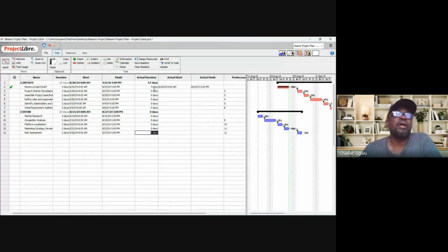If it's approved, then you have to rebaseline it. Anytime your actual is deviating from your expected, you need to report it immediately because you are going out of alignment. Are you getting that?